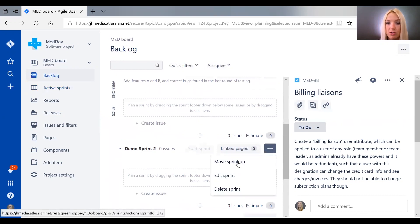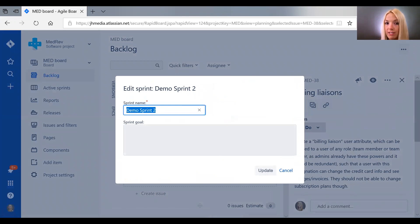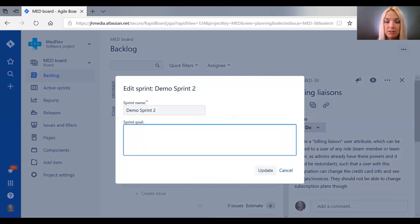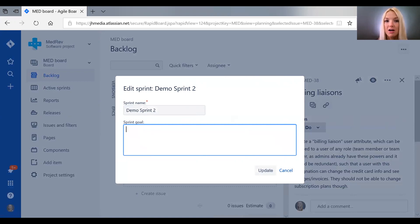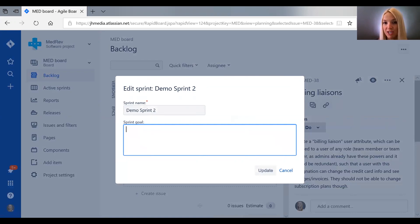What you can do is you can edit the sprint, and you can rename it to whatever you like, and you can write the sprint goal. Now, keep in mind, a sprint is a discrete length of time, typically two weeks. We don't always know what exactly is going to fit into a two-week period. We can give our best guess, and we can have an aim. But JIRA understands that reality happens, not every ticket gets done in the sprint that you plan it to. And I'll show you how JIRA handles that in a second.